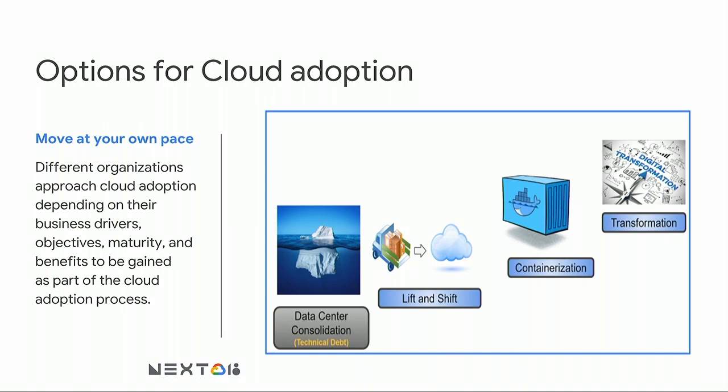And like I said, one of the things to think about here is that each application you can really pick and choose. If you have an application that is not maintained but is heavily used for certain periods of the month, that really makes sense from a lift and shift perspective. You're not going to get a lot of benefit out of refactoring and recoding that application. Whereas on the far other end of the spectrum, if you have an application that's driving a lot of business, there's a lot of data coming and going, it's very actively developed, that's going to make a lot of sense to think about a transformation approach and go through the effort and work to transform that application and recode it from scratch, potentially.